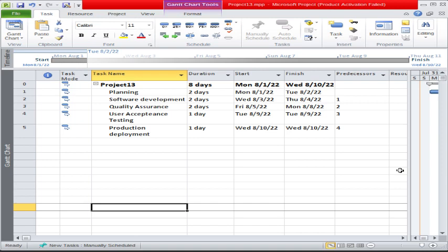Now one more important concept here, friend: there is a difference between a constraint and a deadline. Many people think that constraint and deadline are the same. Friend, a constraint is basically a limitation, in terms of time, cost, resources. For example, your management said that you must complete the project with 5 resources. So this is your limitation. You cannot go with 6 resources. Your customer said that the project must be completed with a 5000 budget. So this is a constraint. So remember that there is a difference between a constraint and a deadline.